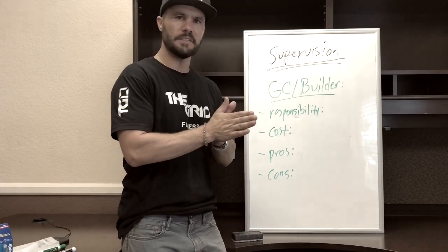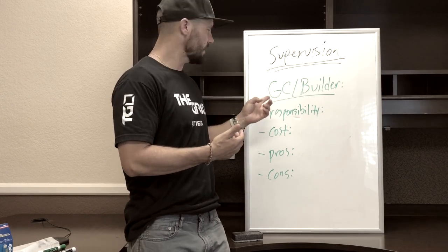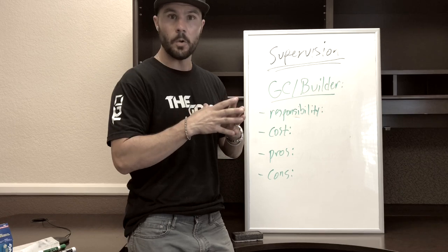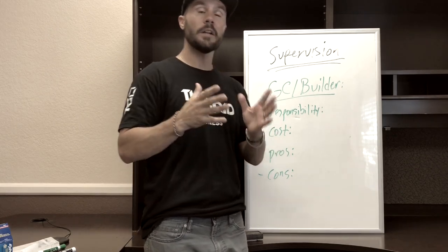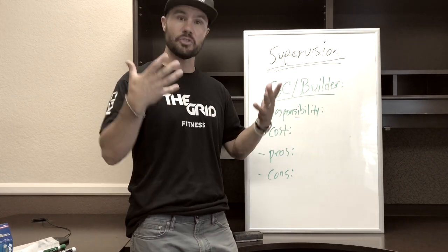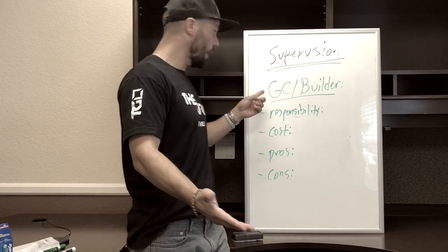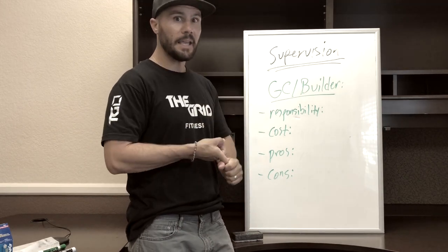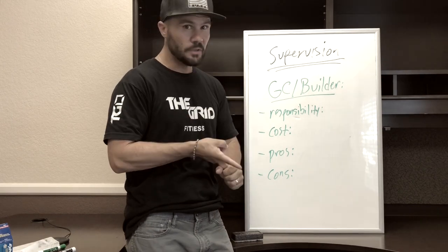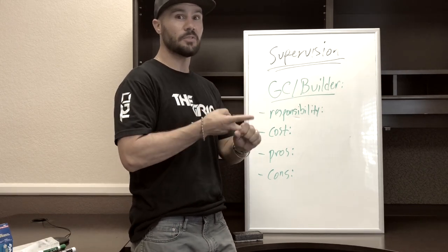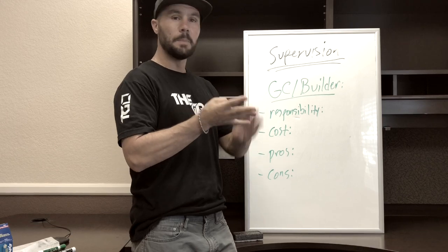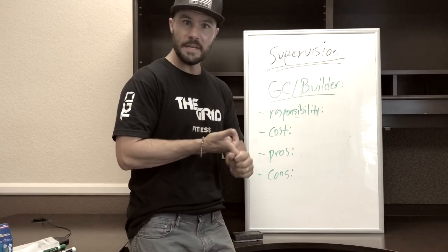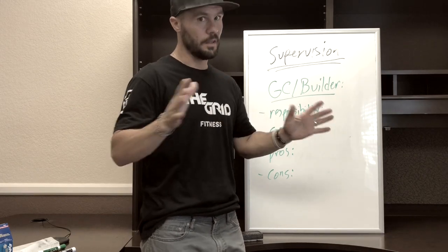I put both of those in the same category. When you're rehabbing, it's going to be a general contractor. When you're building, it's going to be a builder as that role. Now, this person is 100% outsourced. That's the true definition. It means you hire the GC, and he is responsible for the timeline, the scheduling contractors and subs, not only scheduling, but finding, getting bids, scheduling, permits, inspections, all of it.